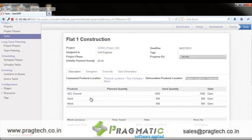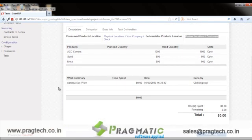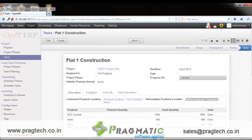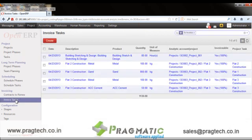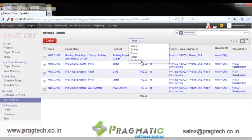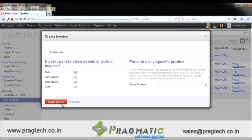Apart from products, the user may also consume services to accomplish a task, such as labor or legal advice charged on an hourly basis. The user can mention the service hours. Once the task is completed, it proceeds through different stages, and once fully done it becomes available for invoicing. The user can select multiple tasks and create an invoice against them by clicking 'Create Invoice'.